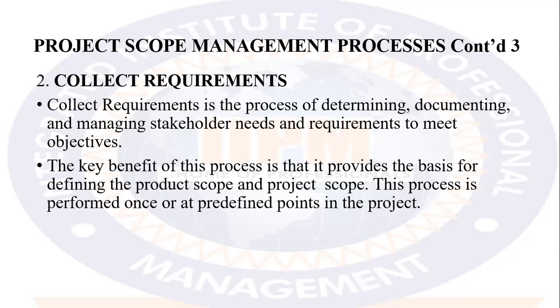Okay, from Akinta in the chat room, say you have to be very careful when it comes to the development of software for a client. You have to state the terms before this client. If there is going to be an addition to the software after the project is delivered, will it be at your expense or the expense of the client? Okay, these are some of the trends you now need to consider, tailoring considerations. Then I said the training of those that will use the software after development, will it be free? Or will the cost come with the cost of software?